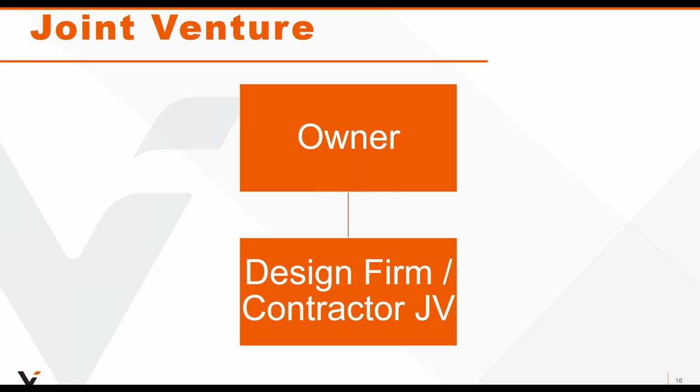Again, you have to be aware of the legal responsibilities that you own. You have something called joint and several liability. That means that if the entity is indeed responsible and your partner can't meet their end of the obligation, then with joint and several liability, you, the design firm, are not only responsible for your portion, but as far as the owner is concerned, they can go after you for the entire thing, for the entire scope of responsibility, because you presented yourself as a joint venture.